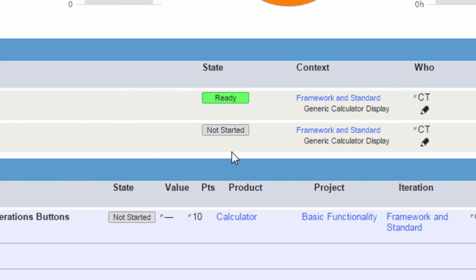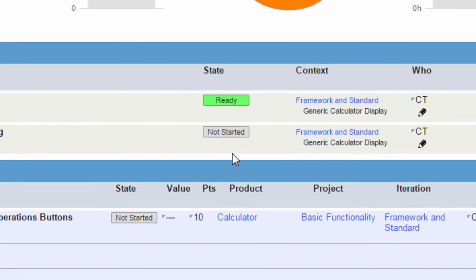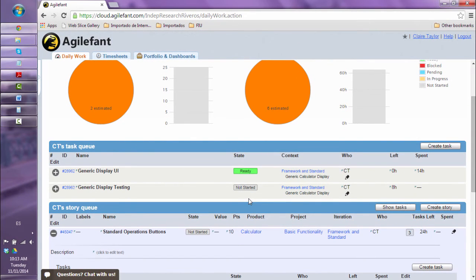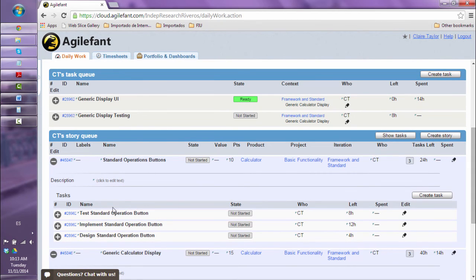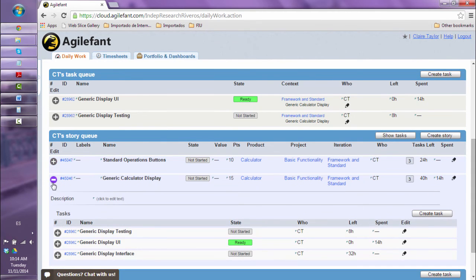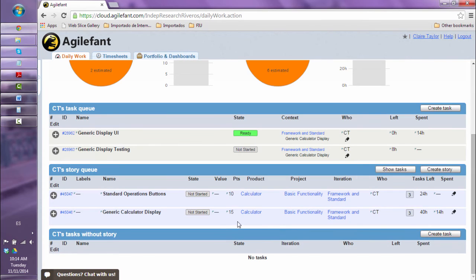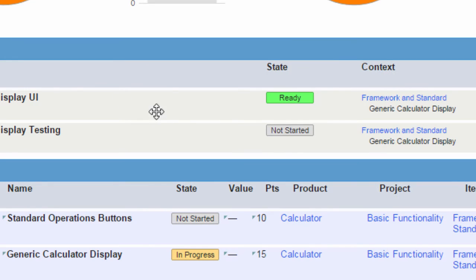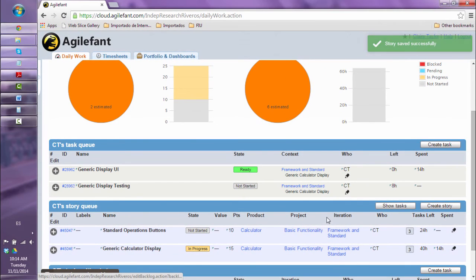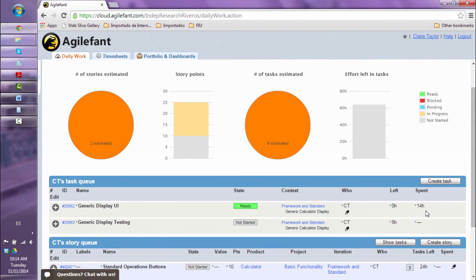Ready means you have finished all your tasks, but you might still be missing some approval or something that is part of your definition of done. When you say done, everything is fully complete on this story and we don't need to go back for any reason. Also, don't forget after you change the status of your task to update the status of your stories as well. Since you only finished one task but not all of them, your story is currently in progress. So I'm going to go ahead and finish adding all the developer efforts for this past week.